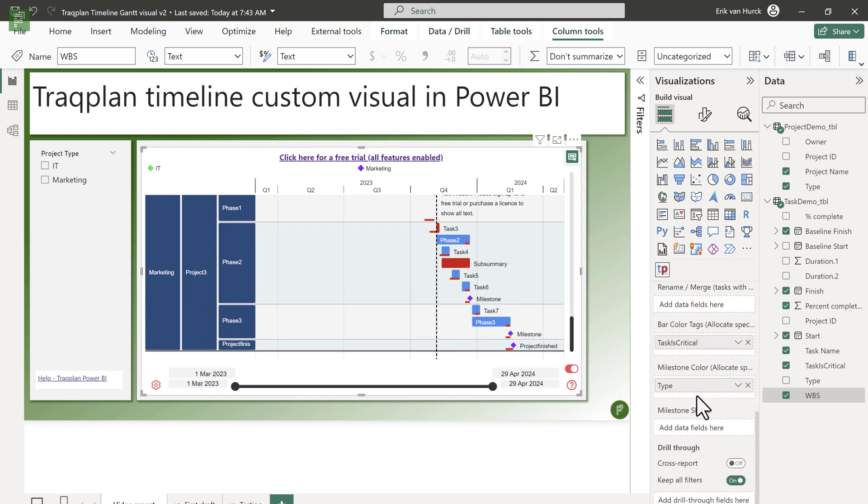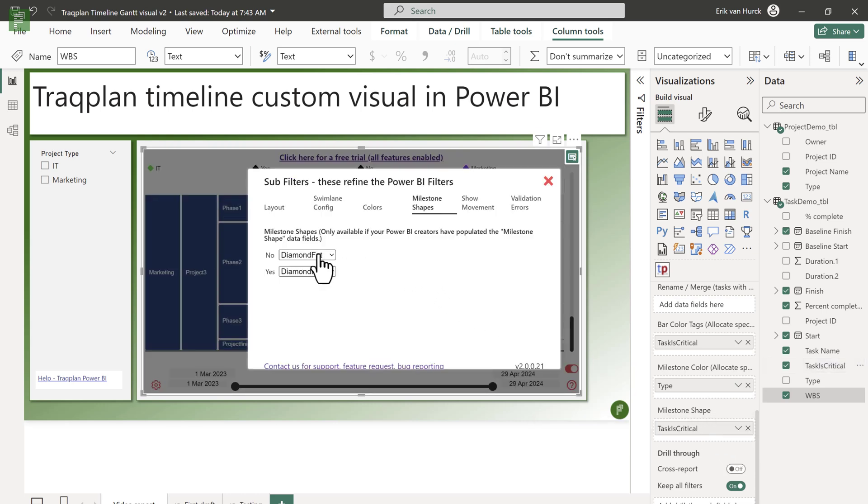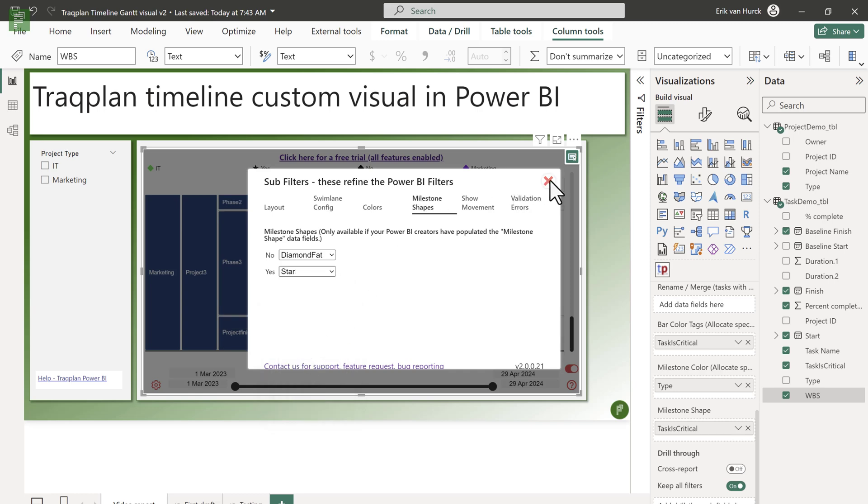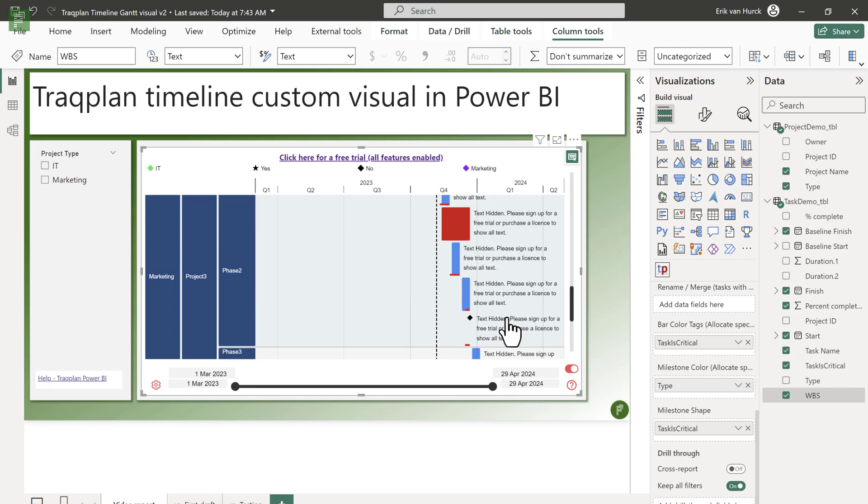Now, let's have a look at that last thing, the milestone shape. You can change the shape of the milestone based on its content. Let's take that task is critical again and move that over to the milestone shape. And here you have that diamond, a flat diamond, which is the basic of a milestone. And we can change that to a star if it is a critical milestone. And you can, of course, change this to multiple values where you might distinguish a decision point or a key milestone or a gate review or anything like that. But if that's in the data, you can use that to change the shape of your milestone. And on top, you see your stars, you see your diamonds and different colors as well. So that is nicely reflected in the data.